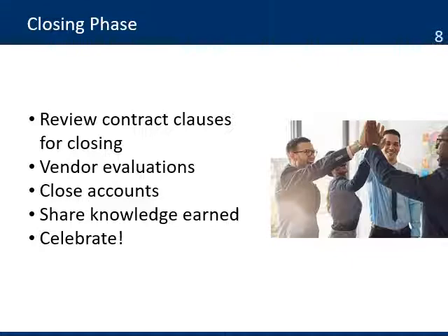Vendor evaluations. You need to provide information to the procurement unit on the performance of the vendors used by the project. That information will help future projects. Close all bank accounts. It is important to make sure that all accounts used by the project are closed so you don't have problems later on with some open accounts and overdraft fees.